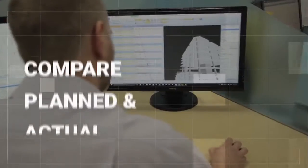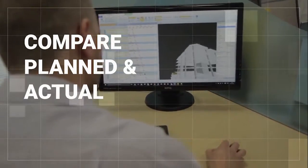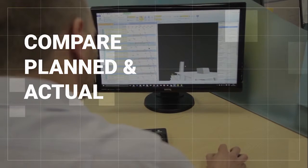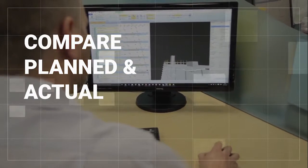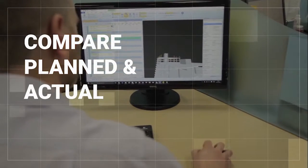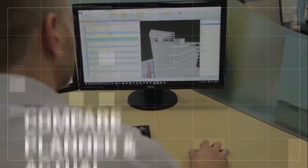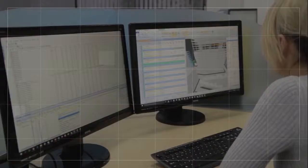With all the information in one place, it is easy to compare planned and actual schedule plans in 4D, utilising PowerProject's baseline functionality.